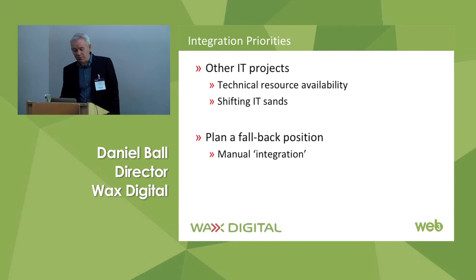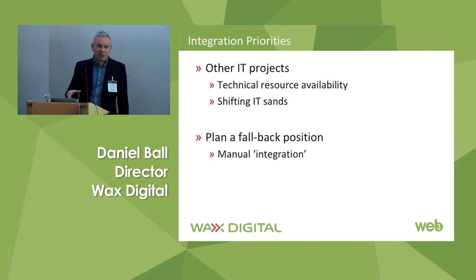We're working with a global organization currently on a supplier information management program that totally transforms their supplier onboarding process, their data management, takes it completely electronic, ensures that suppliers are automatically reminded and then put on hold if they don't keep data up to date. It's a brilliant system, I think, but we've been waiting over a year now for an SAP upgrade on their side so that we can seamlessly integrate that with their finance system.